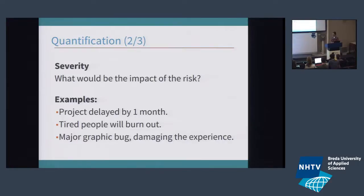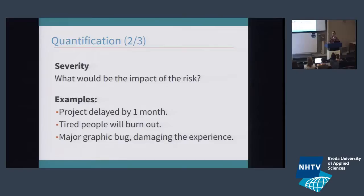The second is severity — what would be the impact of the risk? Will it delay the project? Will it have a big influence on people? Is it something that happens in a part of the game, or is it one of the core systems that makes your game utterly unplayable? You could have several layers of severity to objectify these risks. Often, it's quite difficult to put a risk into a quantification of severity by itself, but if you compare them to other risks, you can say it's more severe than this one. It's often through comparison.